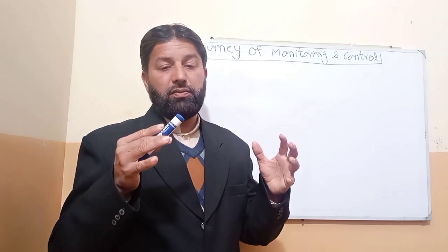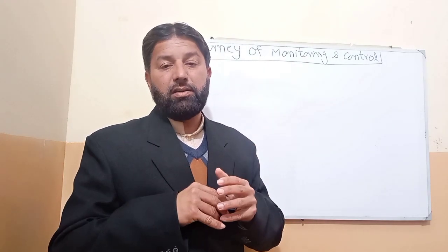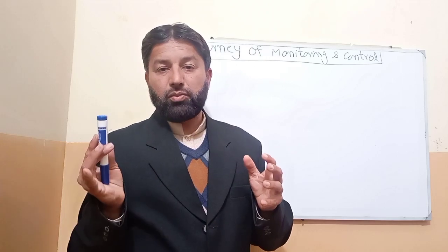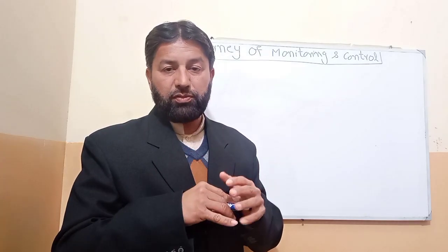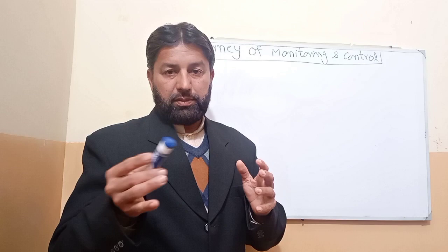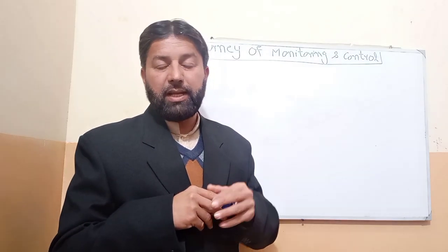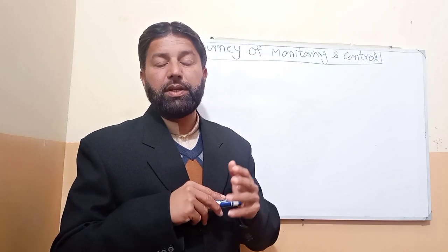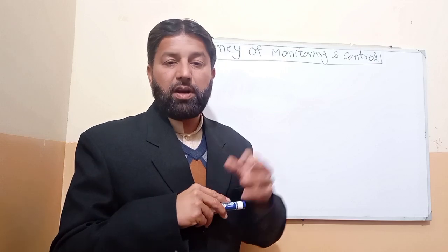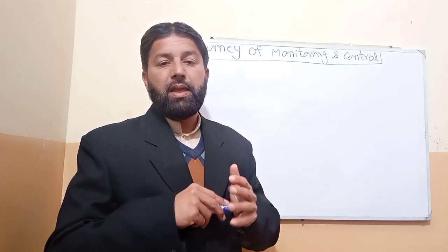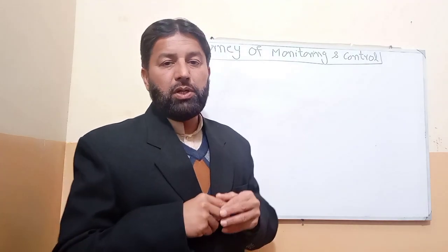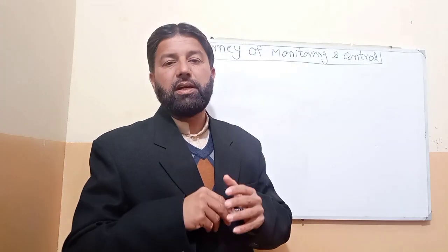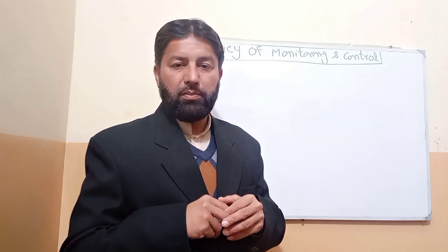And the journey of work performance data will come to validate scope, to the stakeholder input. We will get work performance information, and then later it will go to the integration of monitoring and control. We will get the work performance report, and we will do all these things in the monitoring and control process.